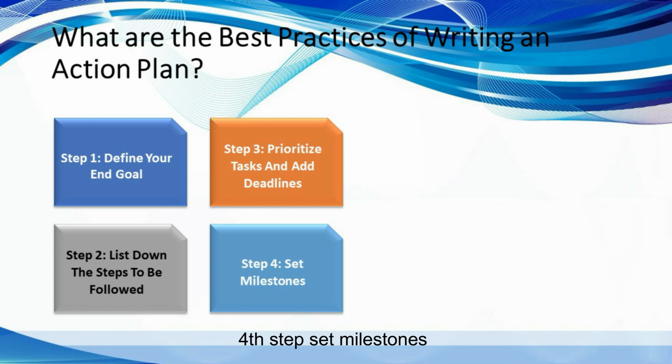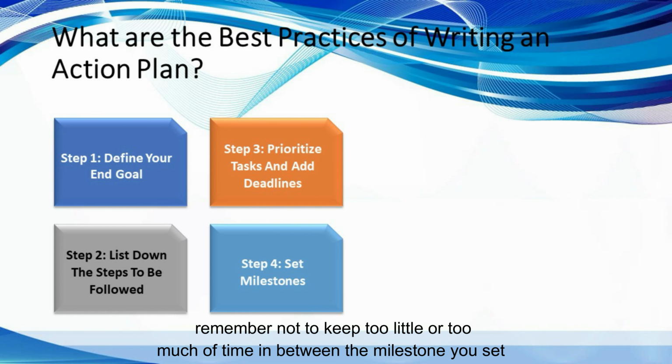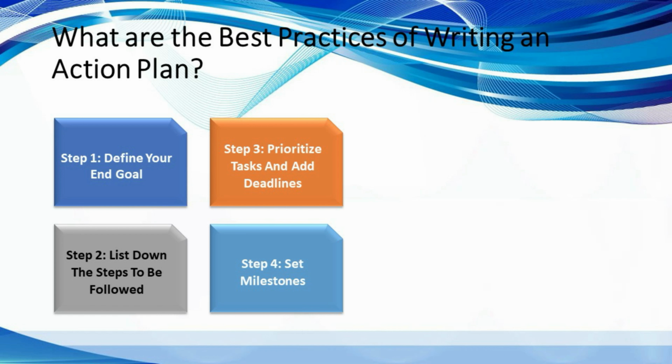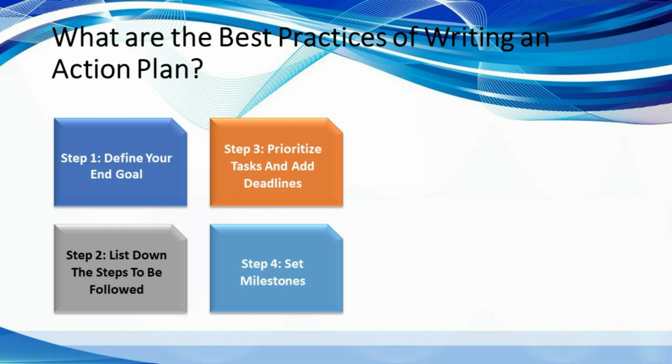Step 4. Set milestones. Start from the end goal and work backwards as you set the milestones. Remember not to keep too little or too much time in between the milestones you set. It is a best practice to space the milestones 2 weeks apart.